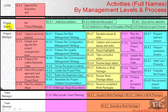The project board also carries out authorise initiation, authorise the project, authorise a stage or exception plan, give ad hoc direction, and authorise project closure.